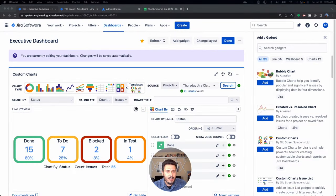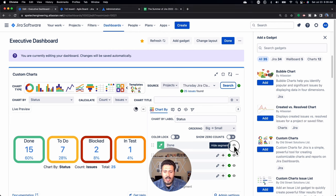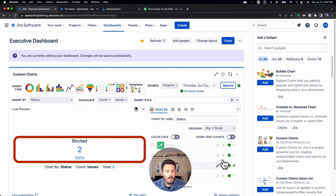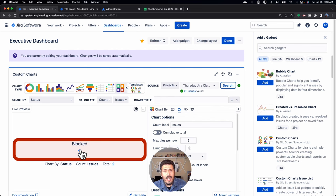I'm going to chart by status, since in this case I'm using the status of blocked. The only modification I'm making: I don't care to see done, to do, or in test — I just want to see the blocked. I don't care about the percentage; I just want to know how many blocked issues we have, and I need a link so I can go address those impediments. This is one way of doing it — I'm just hiding all the other statuses I don't care for. You could also add a micro JQL to get your blocked issues, and optionally sort by created date so you see new blockers as they pop up. I just want to see the total number of blocked issues so I can take action as a Scrum Master and start removing impediments for my team.